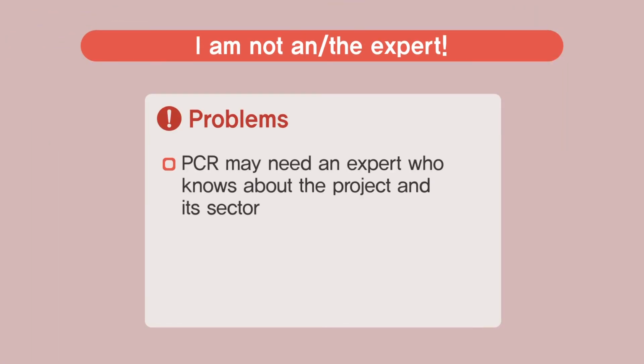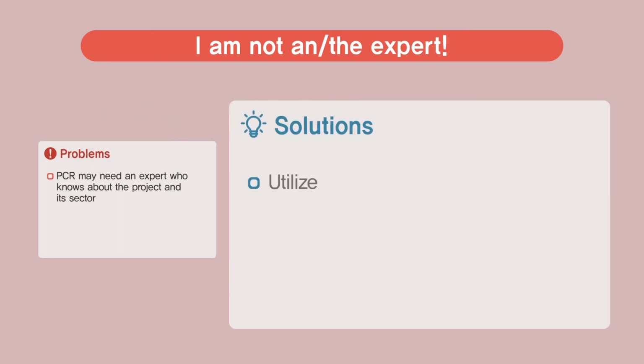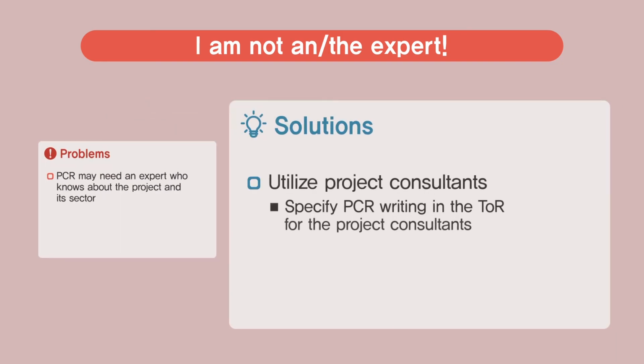PCR writing is usually the job of the consultant hired for your project. It means you have to include this in the terms of reference for your consultant. Sometimes, PCR is not included in any of the consultant or expert's terms of reference because it seems so far away at the beginning of the project. This will create a lot of problems at the end of the project.